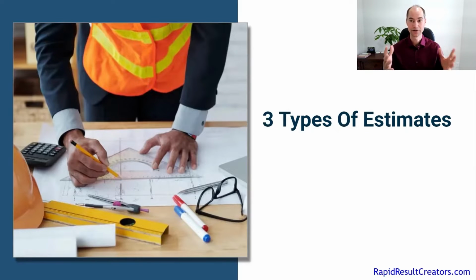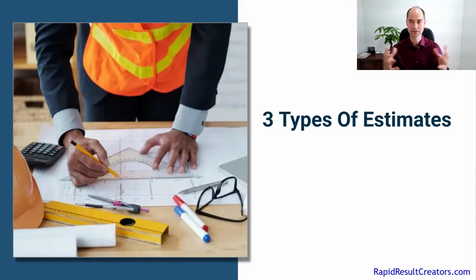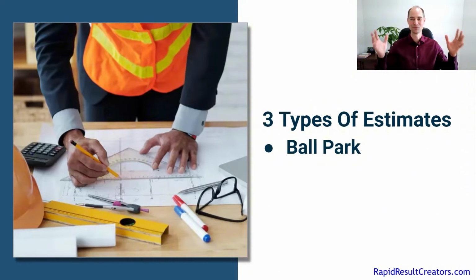that's going to increase your profits, help have a repeatable system that you can delegate, and I'm going to be going through what all the different components are. So there's three types of estimates, and then there's a number of different ways to incorporate all of these into a streamlined system. So the three types of estimates are: one is a ballpark estimate. I'm going to be diving into these in more detail a bit later, but essentially a ballpark is just a figure of scale. Is this project going to cost 100,000, a million, or 10 million, right? Like what's the ballpark that we're working with here.